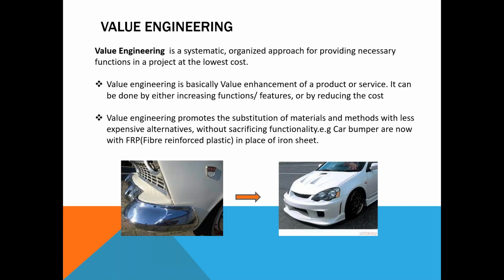Value engineering. Now, value engineering, what we already talked about previously. Value engineering is nothing but a systematic, organized approach for providing necessary function in a project at a lower cost. How it is a lower cost, I'll tell you. See, you can see here below. This is a car which was having an iron bumper. Now this has been replaced by FRP or fiber reinforced plastic. Function is the same, but it is a reduced cost. This is nothing but value engineering.